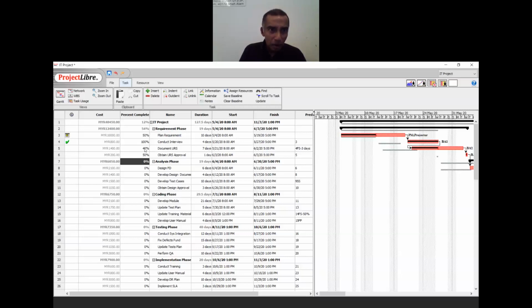When you total up all of these, 50 plus 40 plus 100 plus 50, the average is actually 54% for the requirement phase. But for the entire project, so far you've done 12%. So it will automatically roll up the progress as well. That's one of the beauties of all of these softwares.